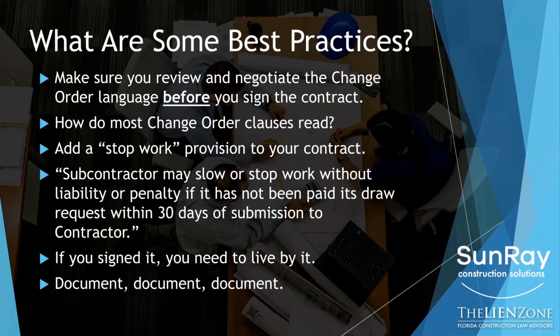Are you sending emails highlighting those issues? Do your daily reports show that these issues are impacting your work? Are you taking photos of the areas that are impacting your work? If you're not doing those things, what happens is that when it comes time to close out the job and a dispute may arise, you don't have the backup to support your position of why you ended up where you are on the job.